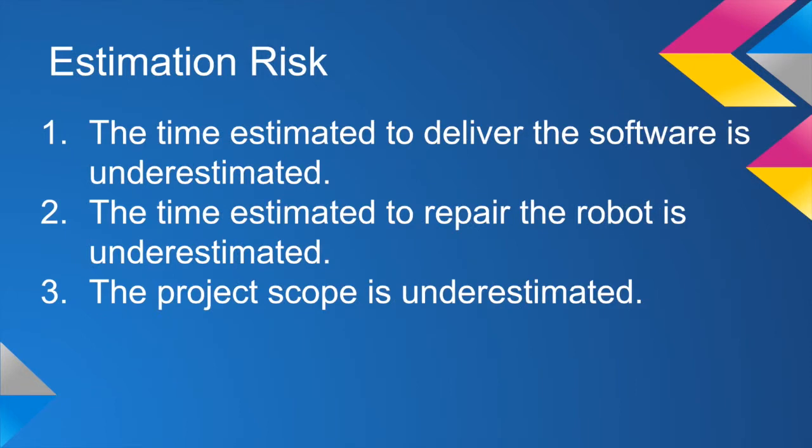Finally, we have estimation risk. This risk talks about the dangers of underestimating elements within the project. For this project, they are time estimated for delivery of software components, time estimated for repair of robot in case of damage, project scope underestimation resulting in inability to meet deliverables.